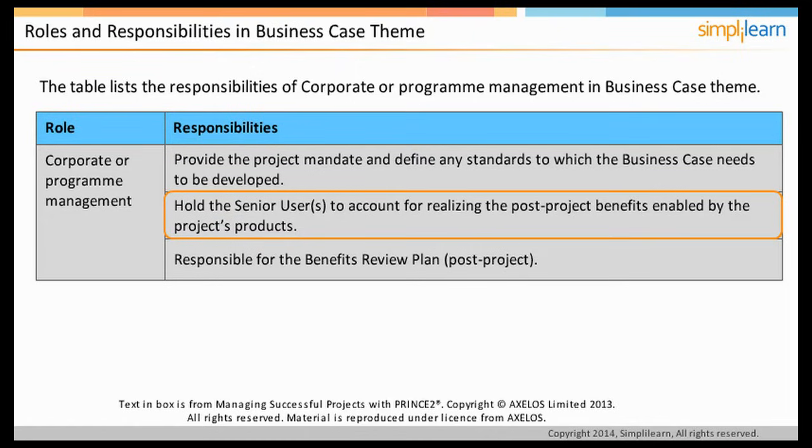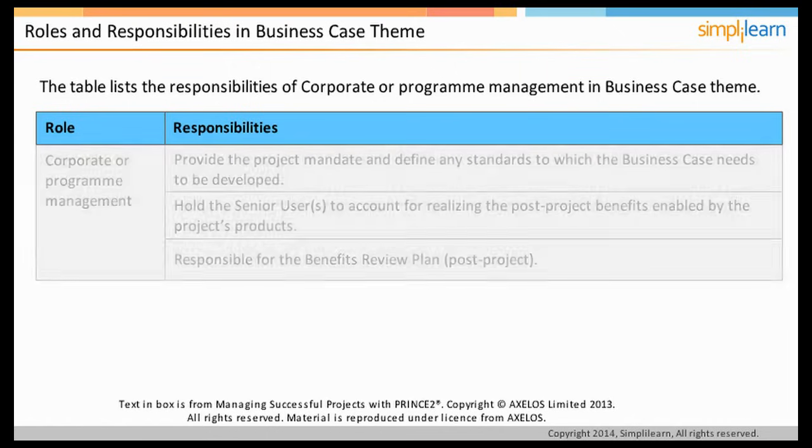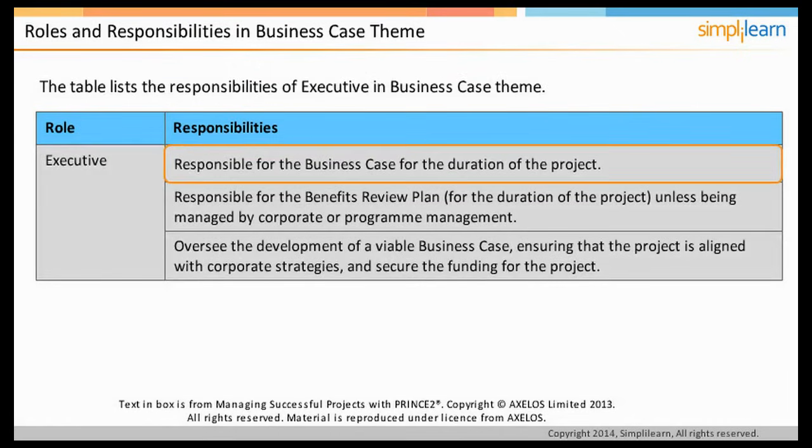The corporate is also responsible for the post-project benefits review plan. Senior supplier confirms that the products required can be delivered within the expected costs and are viable. Executive is responsible for the business case for the duration of the project.